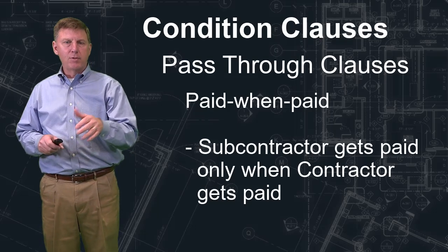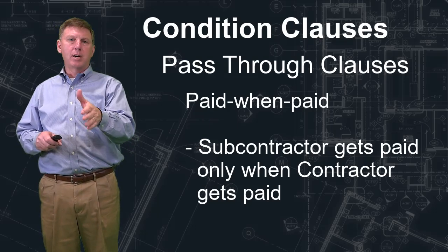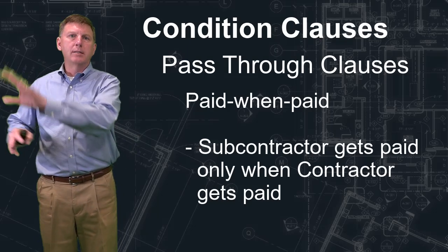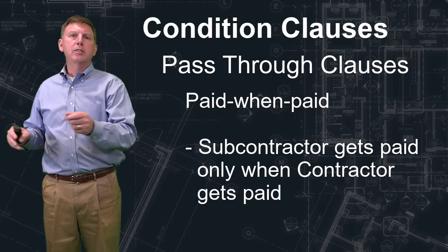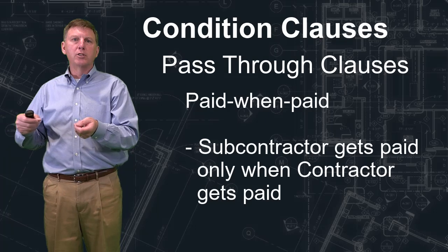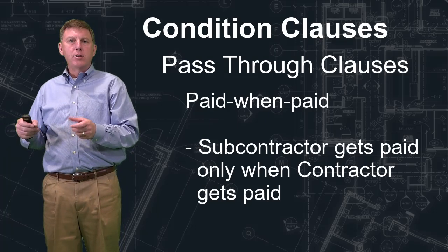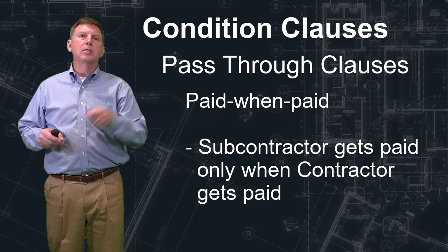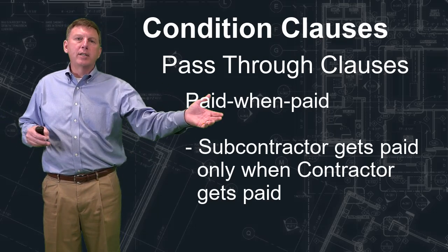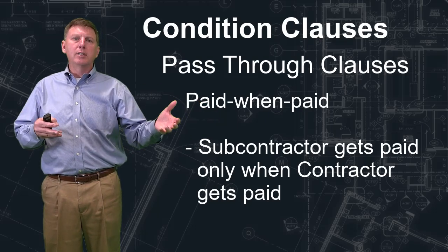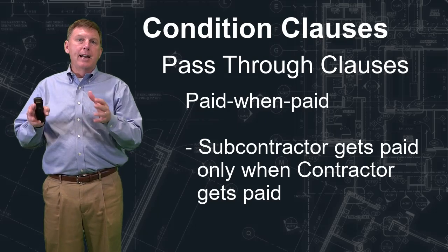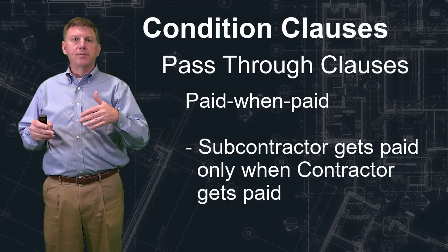Now you think about that for a moment. Let's say you have a subcontractor out on a job, electrical subcontractor, they complete the work, right? They wire a building, and then they submit to you an invoice. Okay, you take that invoice, you take other invoices from other subs, supplies, and so on, and you put together an invoice for an owner. So you turn that over to the owner. Well, already time has passed by the time the owner gets your invoice. So the owner gets your invoice, they look it over, they look at the work, make sure you did the work, and eventually they get around to paying you.